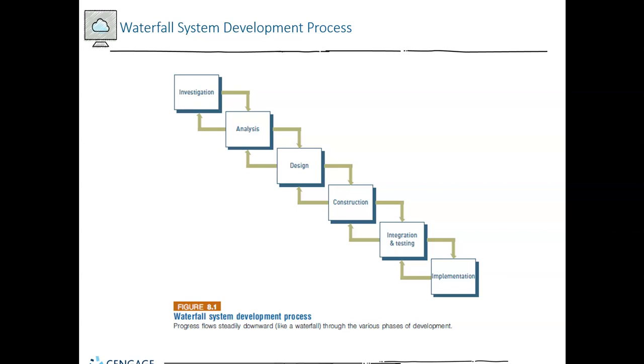Then implementation is when you say, okay, this is what we're using now, and you do the switch over. The term for it is cutover. These things that I'm pointing out, by the way, if I just say the name like that, you probably won't remember it for the future. So cutover is the point in time, the crisis point, when you go from the old way of doing things to the new way of doing things. So let's get back to this waterfall. In general, though, I talked about each of these steps.